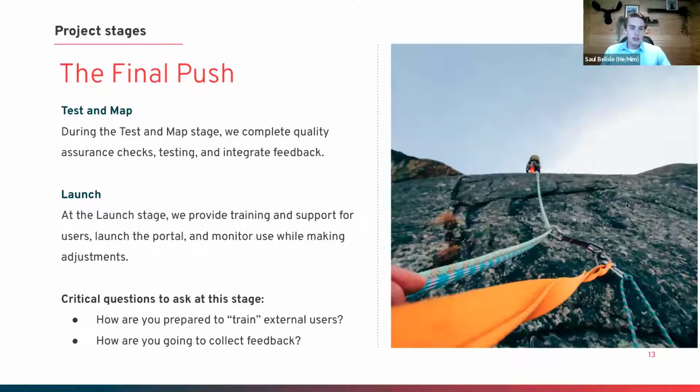After the build stage, it's really a downhill sprint to the go live. There's a couple last stages that you have to get through. This is where you have your last rounds of feedback and quality assurance, your last rounds of integrating feedback. If you have any data migration in scope, this is when you would finish that data mapping, transformation, and migrate that data to the new system. And then it's all about training, communication, and going live.